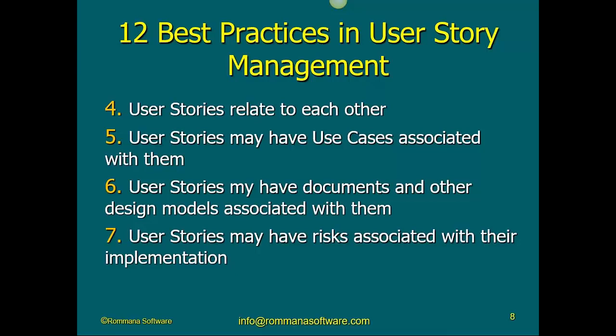Is it a secret that user stories relate to others? Absolutely. A user story must be implemented before another user story. That's interdependencies between user stories. A user story must be tested along with another user story. A user story has some details that will help the other user story. So there is always a relationship between user stories. That's a given. And when you do user story management, you have to watch for that, and you have to be able to document relationships between user stories.